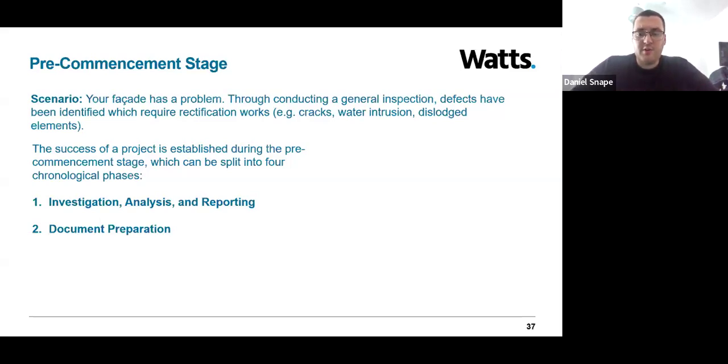Following the establishment of all of those defects and the underlying causes, a detailed pack of information should be prepared prior to approaching the market. So a good successful project should see good quality workmanship addressing issues correctly and at source, and those should be addressed on time and on budget. And a well-prepared and robust pack of information is really key to achieving that.